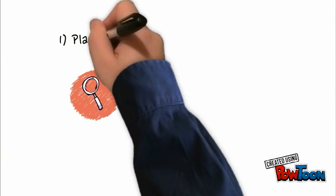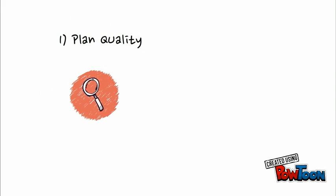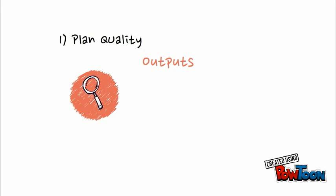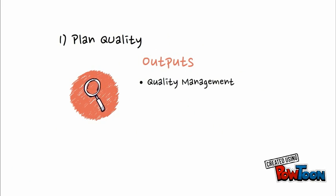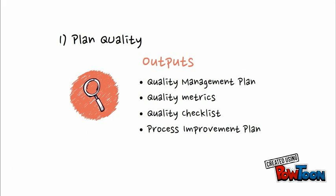Plan quality involves identifying the quality requirements for both the project and the product, and documenting how the project can show it is meeting those requirements. The outputs of this process include a quality management plan, quality metrics, quality checklists, and a process improvement plan.